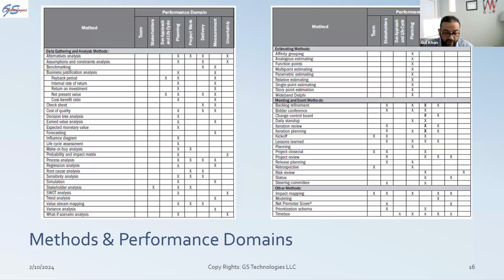May, 25th of May, June and July. So that's 2 months. And now from 25th of May, I have time to do the project initiation and requirement gathering between today's February and the project kickoff, whenever the project kickoff is. Let's say it's going to take whatever the time. And if I don't know exactly what my project kickoff date would be, and I need, let's say, 2 months